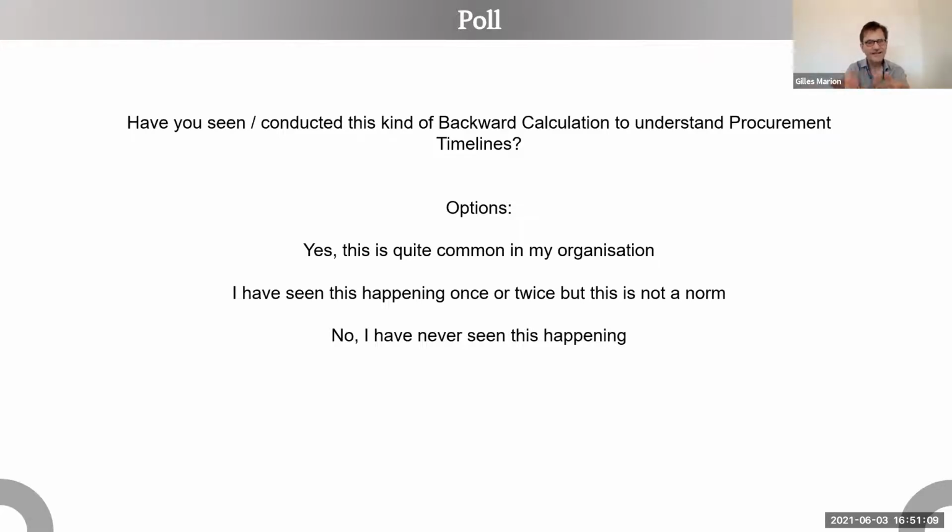Then the supplier says, yes, of course we will do it, but the price is not going to be the same. And then you are not in a position to negotiate because you need to have something. So being disorganized has a cost in the way you negotiate, but it also has a cost for some specific responses that you will need.